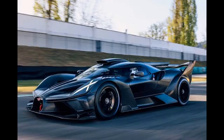3. Fabrication. Purchase high-quality materials like chromoly steel tubing exceeding typical specifications and aerospace-grade titanium sourced from reputable military suppliers. $50,000. Fabricate the chassis and other custom components with meticulous precision using advanced techniques like robotic welding for unmatched strength and weight savings. $70,000. Total fabrication costs, $120,000.